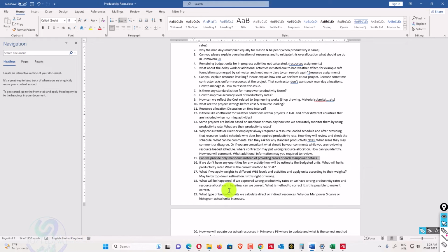But if you are following the exact schedule and your resource allocation is not meeting that, it's not possible to deploy 300 people, or if it's lower than what you are doing on the site. So if it's lower or higher, is there any method to change your baseline? Because in the baseline what we approved mostly is the quality checks and the timeline. So when it's considered about the claim for the delay events, you consider the duration, the relationship, the completion, and the activity start and finish. So you can change your resources for that one. So resource allocation can be revised.